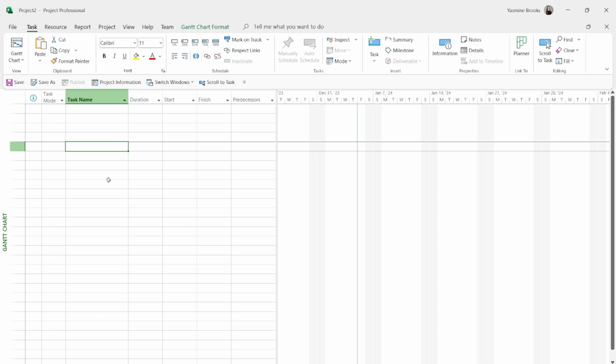And you are going to plan a project to paint a new room. So you are going to redecorate your house and you want to figure out how long it's going to take for you to paint an entire living room, for example. So another best practice in project management is that whenever you have a project, you try to break that down into smaller parts. For example, what is your project? Paint the living room. But what activities do you need to accomplish in order to paint the living room? So first thing, before you can paint the living room, you have to figure out what color you're going to paint the living room.